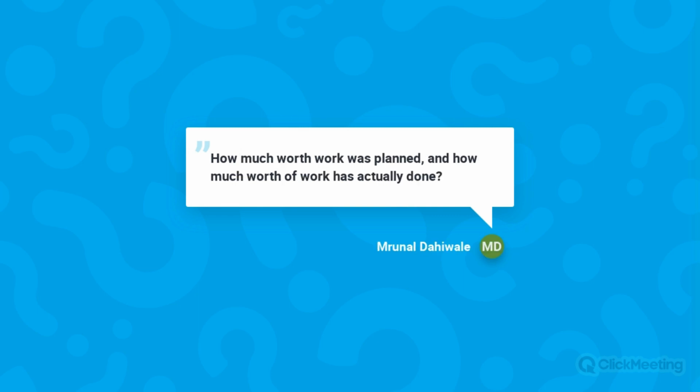How much worth of work was planned and how much work was actually done? I'll open that one up to Dr. Bhargav. Yeah, I think that was the expansion of the previous question, because Mandar has now responded saying great. So that's probably answered. But yes, that's all tracked within Visilean, so you can check through the schedule. In terms of how the data exchange works, we have import-export functions with all major planning software, like Sebastian has mentioned, for example P6, Asta, Microsoft Project. You can import your plan, but you can also export back the actuals to those planning software and track against them and forecast. And you can also re-import new versions of the plans as well. Okay, thank you.